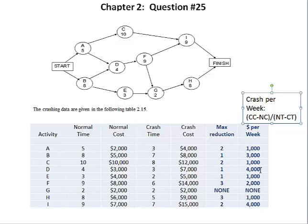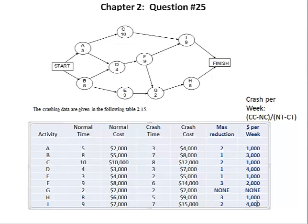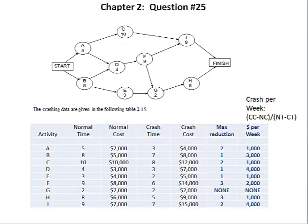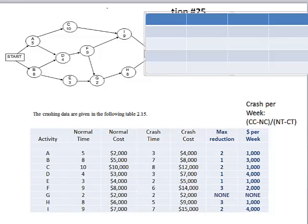This is very important — you need these values. Because based on this, I can immediately eliminate activities I and D from even considering crashing, because their crash cost per week exceeds the $3,500 per week threshold. So the first thing we're going to do is construct a table with the total project completion time across each path and determine which one is the critical path.